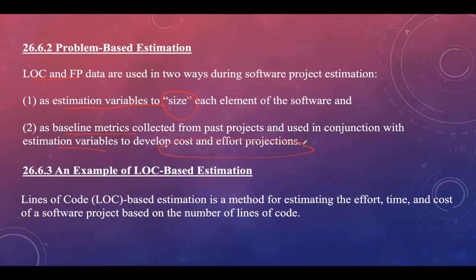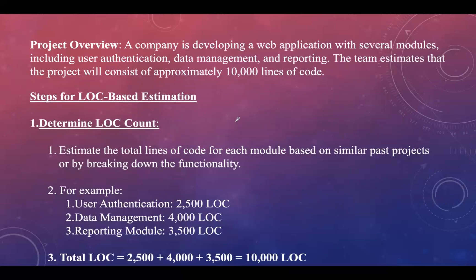LOC stands for lines of code. LOC-based estimation is a method for estimating effort, time, and cost of a software project based on the total number of lines of code. For example, a company is developing a web application with three modules: user authentication, data management, and reporting. The team estimates the project will consist of approximately 1,000 lines of code total. Step one is to determine the LOC count.